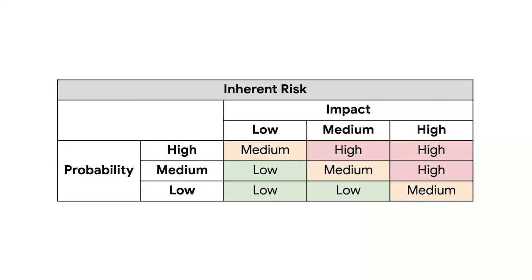When you're creating a probability and impact matrix, it's important to ensure you create a matrix that meets accessibility guidelines and has information and formatting that everyone can easily and quickly understand. One way to do this is to use both color and distinct shapes or text to communicate levels of risk. You can learn more about accessibility communication by visiting course resources.